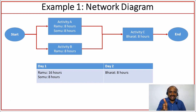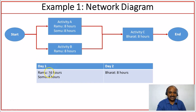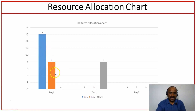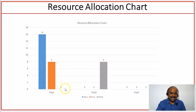If you look at the day-by-day workload, on day one, Ramu is loaded with 16 hours — he is planned to work eight hours on Activity A and eight hours on Activity B, so he is assigned 16 hours. Somu is planned for eight hours. On day two, Bharat is planned to work for eight hours. Our resource allocation chart shows Ramu is assigned 16 hours on day one across Activity A and Activity B. Somu is assigned eight hours and Bharat is assigned eight hours on day two. This is how the resource allocation chart looks, with days on the X axis and number of hours planned on the Y axis.